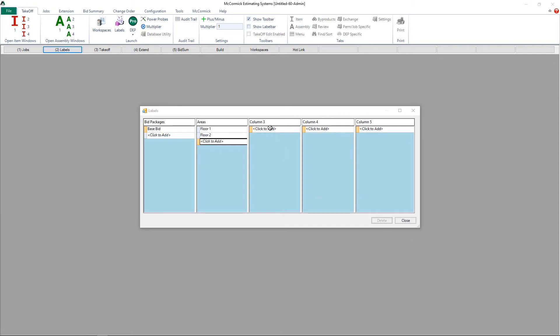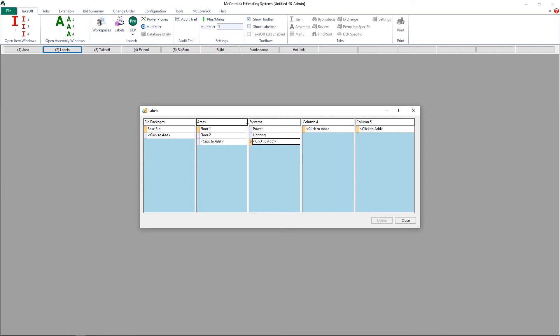Now in column 3, I am going to break the areas out into all of my different systems. So let's go ahead and create a label for our power, and we'll create one for lighting. We'll create another one for our fire alarm, and let's do one more label for our data.